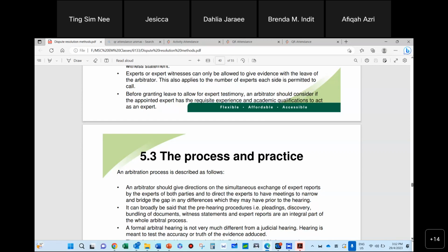Okay, but internationally, if you have any commercial dispute with an international contract, usually it will still be arbitration, because that would be the most informal way. When you have an international contract between Malaysia and, let's say, Indonesia, I cannot use a Singapore court. You're not breaking any Singapore law. But if I go to a Kuala Lumpur, a Malaysian court, would the Indonesian be happy about that?